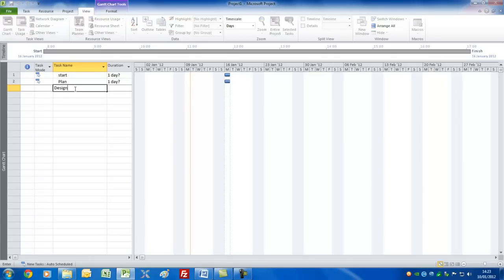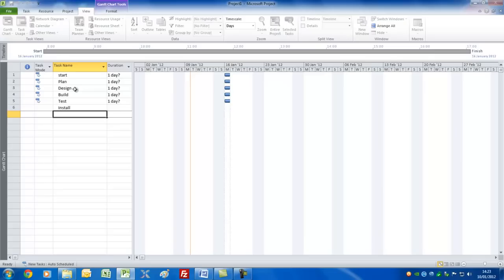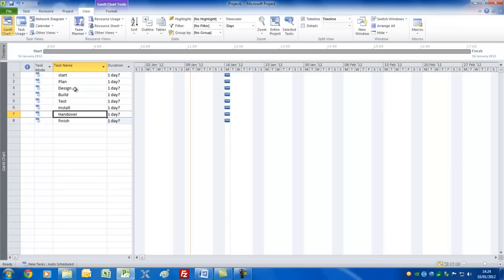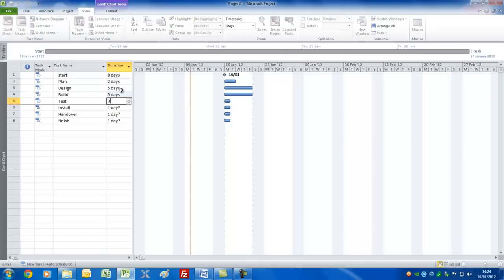Let's enter the rest of the tasks: Plan, Design, Build, Test, Install, Handover, and Finish. They've all lined up exactly on the start date of the project. The question marks show that by default Project is assuming they are estimated tasks. I want 'Start' to be a milestone task, so let's put that to zero. We'll have Plan as two days — I'll use the spin control to show how that works. Then we'll have five, five, three, three, and one day, and we'll set 'Finish' to a milestone as well.